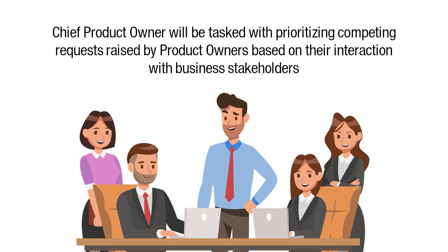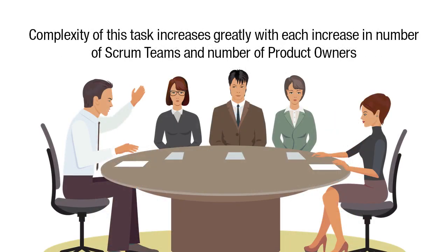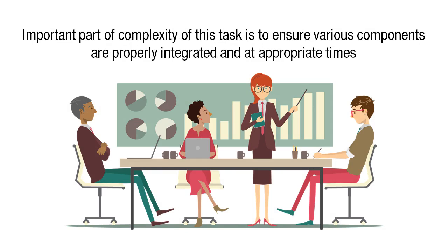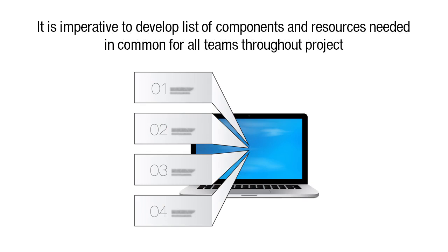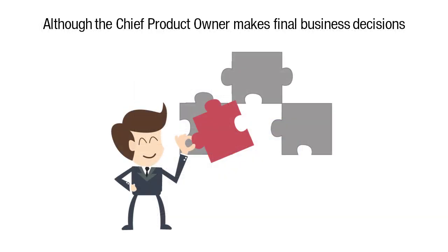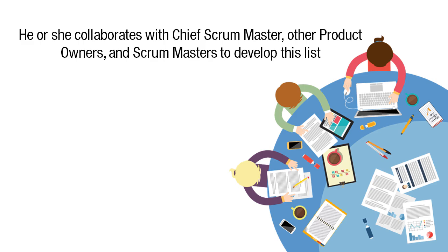In a large project, the Chief Product Owner will be tasked with prioritizing competing requests raised by the product owners, based on their interaction with the business stakeholders. The complexity of this task increases greatly with each increase in the number of Scrum teams and the number of product owners. An important part of the complexity is to ensure various components are properly integrated and at appropriate times. Therefore, it is imperative to develop a list of components and resources needed in common for all teams throughout the project. Although the Chief Product Owner makes the final business decisions, he or she collaborates with the Chief Scrum Master, other product owners, and Scrum masters to develop this list.